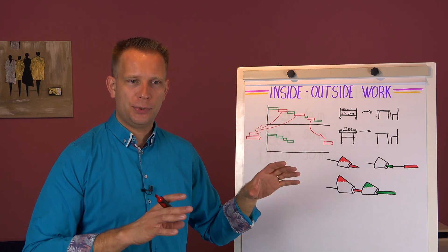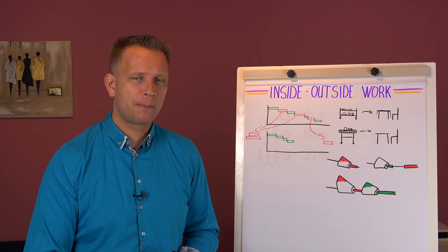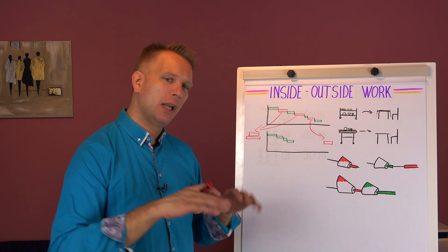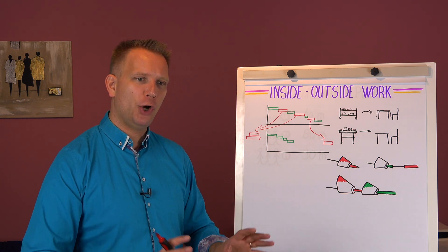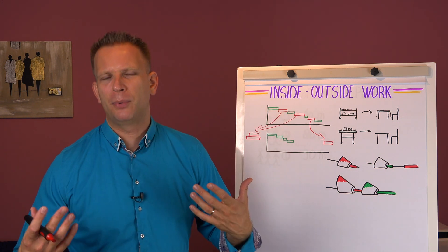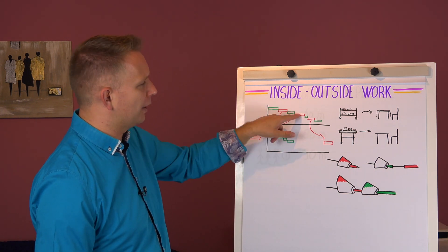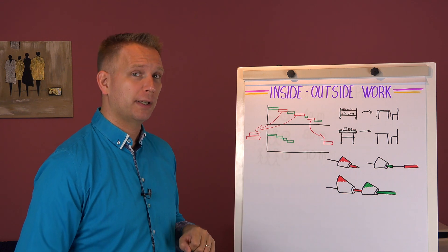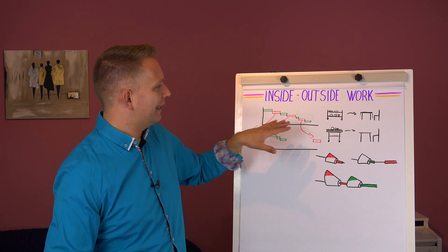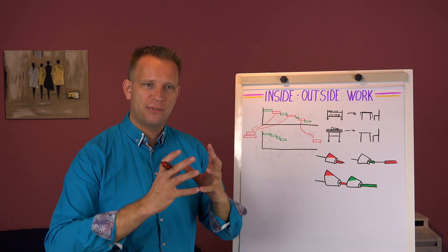Now there's a number of special tools that need to be cleaned, but they also need specific cleaning solutions. The easiest way to make that is during the cleaning, but if we invest maybe in some thermal containers, a little bit of heating, we can keep those solutions nice and hot. Or we make a sort of a small automatic mixer that can come in, but we do need to prep it. We need to put all of the agents already in there. So we prep it before. It takes even a little bit longer than it would have taken during the cleaning itself, but we take it out of the critical path.